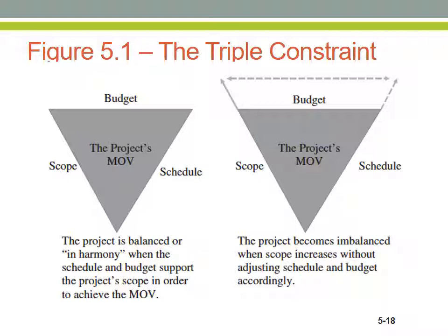And these change requests have to be authorized by the project sponsor. A change request is an addition to the project charter and modifies parts of the project charter. So here, if scope is increased, it modifies the scope statement as it is recorded in the project charter. This is why any changes to scope and to budget and to schedule will have to be authorized by the project sponsor first before they can be implemented.